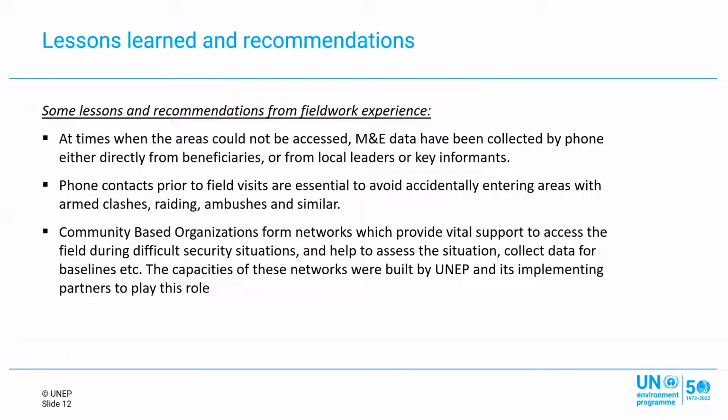What are some lessons learned, and what could be some inspiring recommendations for some of you who are actively engaged in fieldwork? So the team in North Darfur and also in the other parts of the country where we have our projects are very creative. So when there is no access to deliver the activities, the team came up with a solution of, for example, carrying out some community-targeted trainings by radio programs.